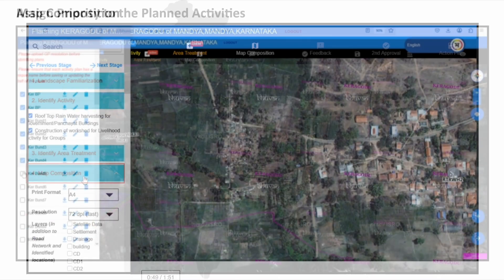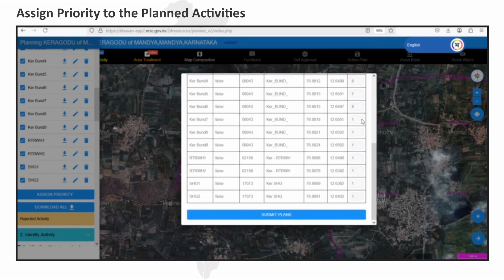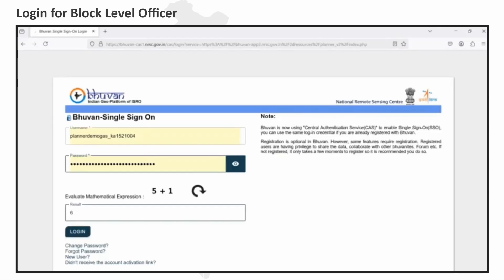The user then composes the map and assigns priority to each activity before submitting for block-level approval. The process then moves to the block-level officer, who logs in using their login credentials.